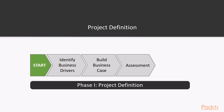If you have deployed a VDI solution already you may have most of this data, but it is worth re-running the assessment so you have up to date data, especially around the applications in your environment. By gathering this assessment data we are creating a baseline of the environment. There are tools used in the assessment phase such as Liquidware Labs Stratosphere, but don't forget to also talk to the end users. This information will also help you plan the number of applications per app stack, bearing in mind that too many applications could increase the risk of conflicts and result in more complex management.